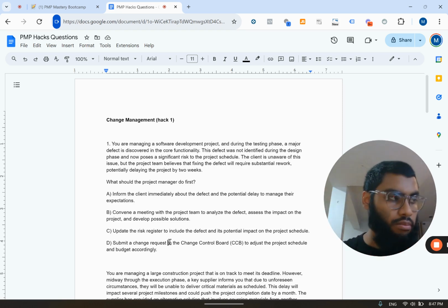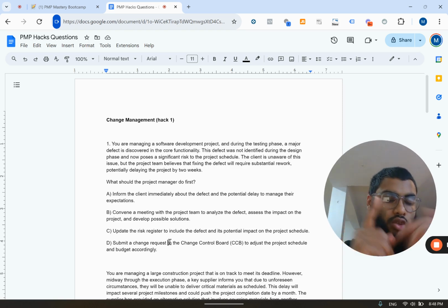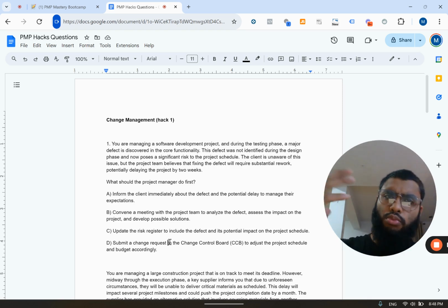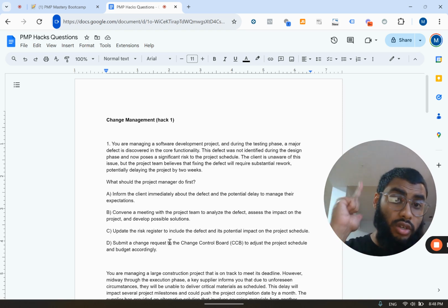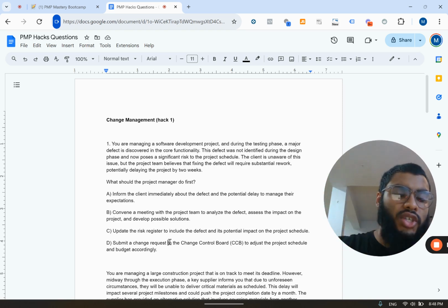Okay? Very important. That is all that you need to know for change management when it comes to the PMP exam. Again, I'm going to repeat this. I'm going to sound like a broken record, but it's so important. Anytime there's a change that affects the project scope, the budget, the schedule, it needs to go through a change request. In contrast, if the director comes up to you and says, hey, can you change the report font to size 15? It's a bit too small. Because that change does not affect the scope, the budget, the schedule, it does not require a change control process.